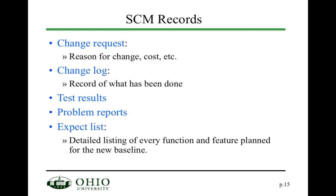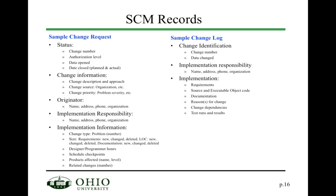Some basic configuration management records include a change request if you want to have a change, and a change log to record what has been changed after the change has been done. Also test results — the outcomes of the tests — problem reports describing identified problems and their resolutions, and an exception list. The next two slides provide a basic layout of some of these documents.